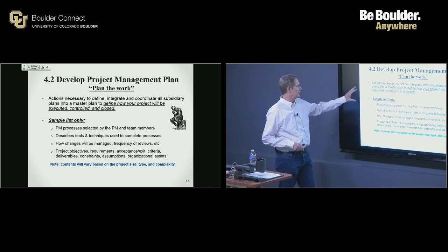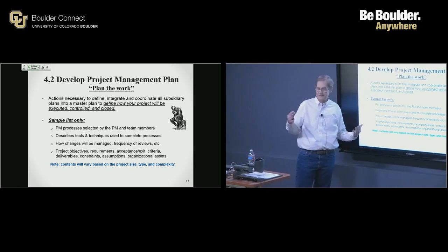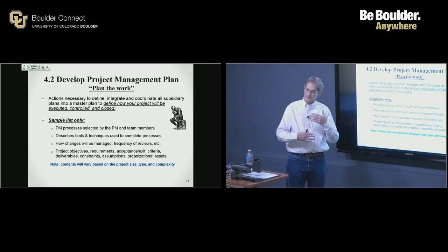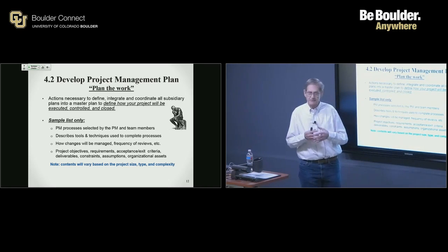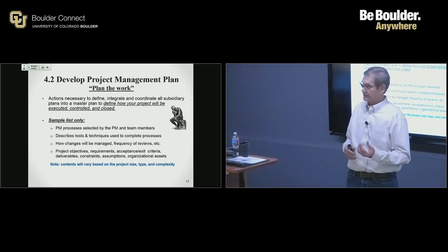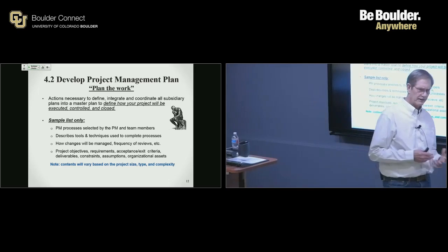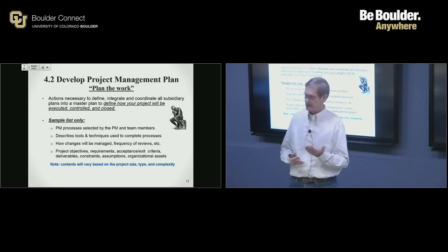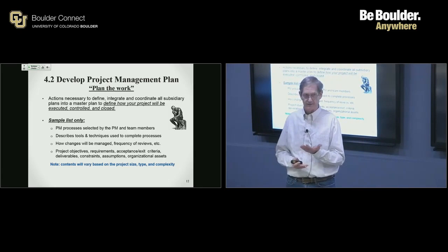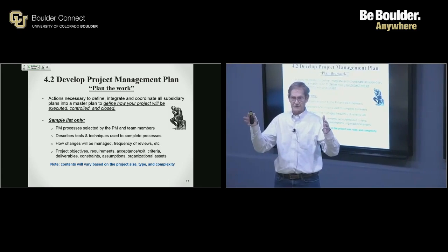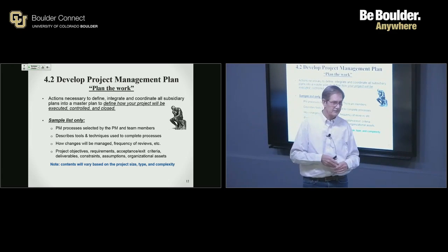The preliminary plan is typically 4 to 6 pages, maybe 8. And then you would further develop the plan over time. You would expand the project management plan even to include subsidiary plans. So what are some other plans that might be either addendums or attachments to your preliminary project management plan? So this is the bigger picture. We talked about that as far as integration management. But there's other plan documents that we're going to talk about.